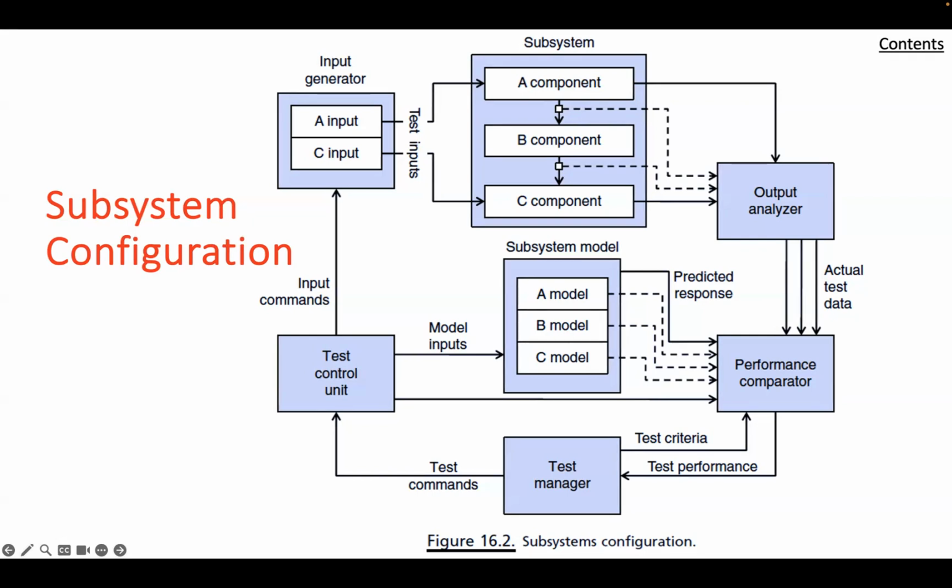Then in terms of the system integration test facility, which is one of the things we'll be getting into in more detail in a little bit, it was noted that special design facilities are normally required to support the integration and test of systems and their major subsystems. This is even truer for the assembly and integration of total systems. Often such a facility is gradually built up during system development to serve as a test bed for risk reduction testing and may be assembled in parts from subsystem test facilities.